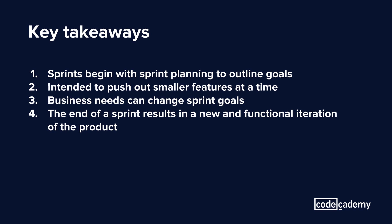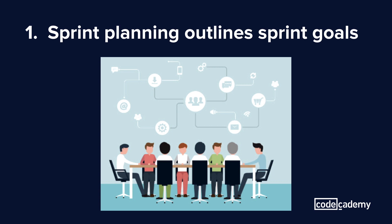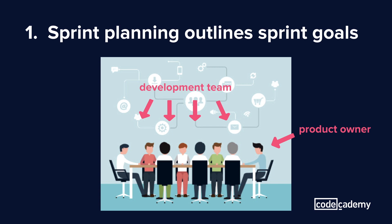Now that we've defined what a sprint is, these are some key takeaways that make sprints unique to other software development cycles and how sprints can accelerate the development process. Sprint planning happens at the beginning of the sprint. In this meeting, the team outlines the goals that will be completed by the end of the sprint. The product owner, who is responsible for the product's growth, will work with the developers to outline a list of goals to be completed.